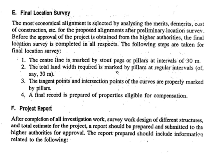After completion of all administration work, survey work, design of different structures, and total estimate for the project, the report should be prepared and submitted to the higher authorities for approval. The report prepared should include information related to the necessity, tentative alignment, surveys conducted, drawings, and cost estimates.